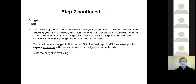Then I work on the budget. If you're writing it in September, your project won't start until February at the earliest and may not finish until December — so it could finish more than 15 months after you did the budget, and costs will likely change. I include a contingency budget to allow for those changes. You don't have to budget to the nearest dollar; in the final report MB requires you to explain significant differences between budget and actual costs. Note that the budget is excluding GST.